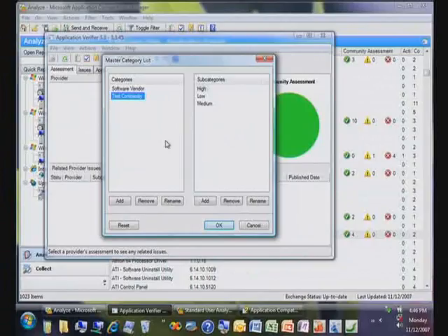Maybe they have a chat client. Maybe they have the looking up for a ticket or making changes to a ticket. That piece of software, usually custom grown. I can find all of the software for people who work in that role. I can test it all at once, and when I'm done, that role is ready to be deployed. I need to define those roles. They vary, not only by industry, but usually by individual customer to customer. I can define that inside of this tool.